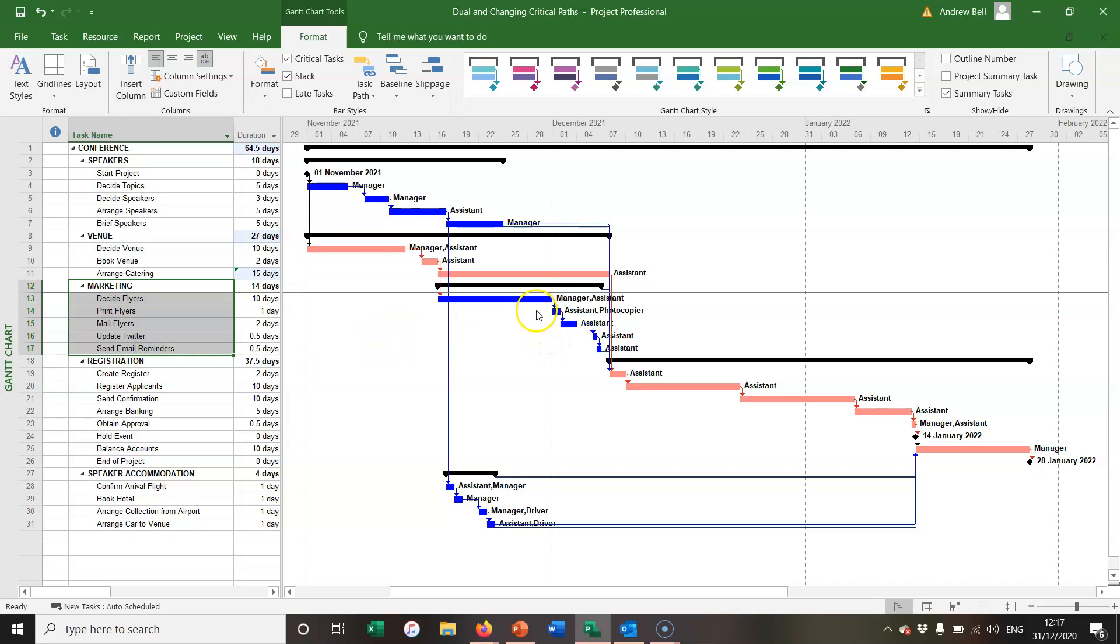However, they're only one day from becoming critical, so perhaps it would be useful to show these tasks as critical.